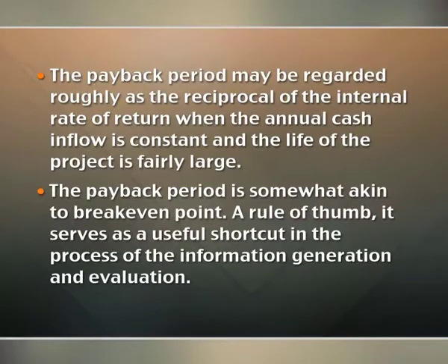The payback period may be regarded roughly as the reciprocal of the internal rate of return when the annual cash inflow is constant and the life of the project is fairly large. The payback period is somewhat akin to break-even point, a rule of thumb. It serves as a useful shortcut in the process of information generation and evaluation.